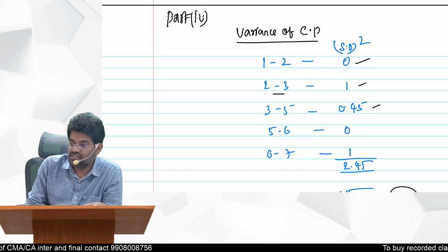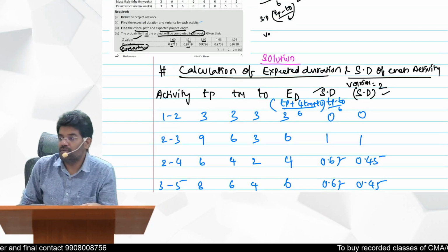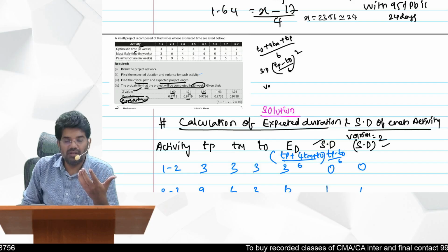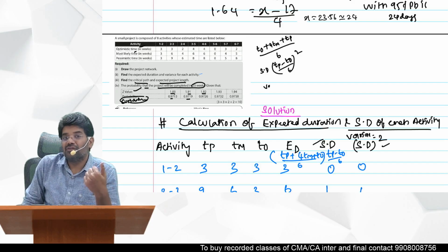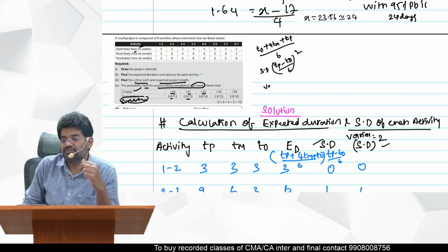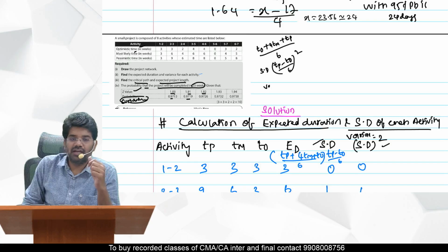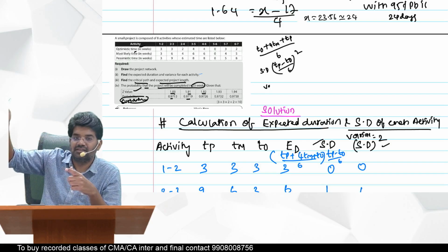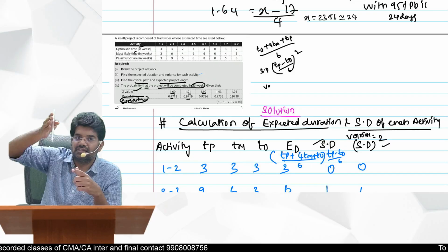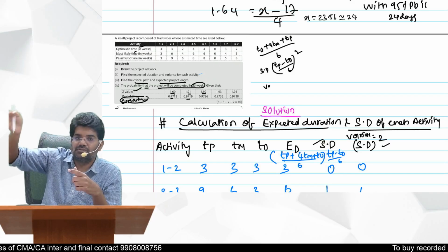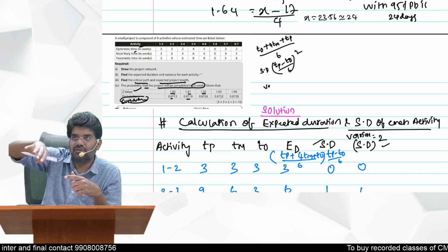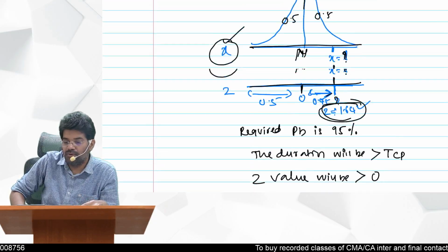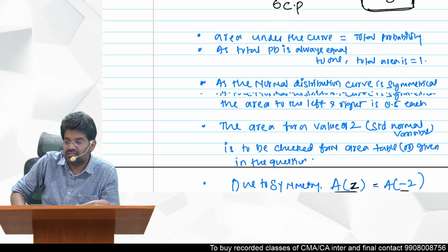Okay, yes, so this is your Program Evaluation and Review Technique. Sometimes they will give you the probability, and we have to find out the x value. In that case, first you find out the z value by referring to the table. The probability they have given, use the table to get the z value, substitute it in the z formula, then you will get the x value. Remaining things you will know now. I hope your concepts got revised, my dear students.